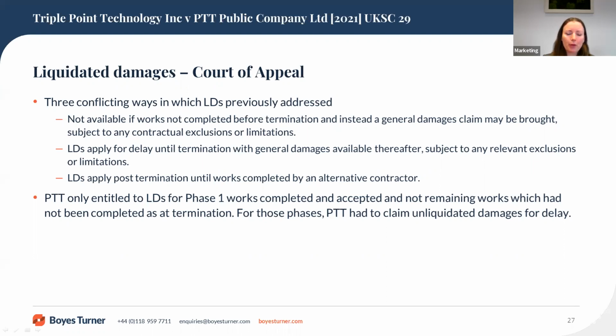He reviewed these different approaches, and it was the second of these analyses that had been previously described as the orthodox approach. However, Lord Justice Jackson considered that whether the liquidated damages would cease to apply altogether or continue up to termination or beyond depended on the particular wording of the clause. And in this case, the clause referred to delay between contractual completion date and the acceptance of the work.